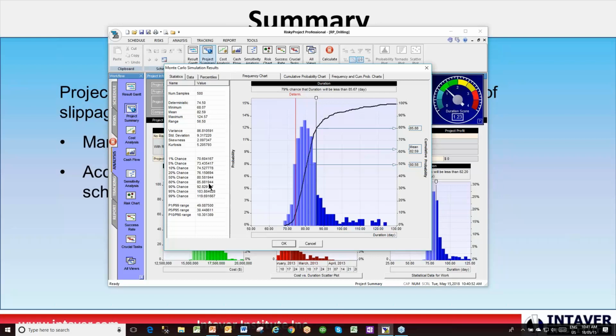The difference at the project level is about 11 days, maybe a little bit more than that, 11.5 days. But that gives us what our schedule margin should be based on the certainty of P80. So this is based on our model, where 8 out of 10 times we'd be confident we can finish in this time. So we can set that based on the difference between our deterministic, which is our plan, and the results at the P80 level.